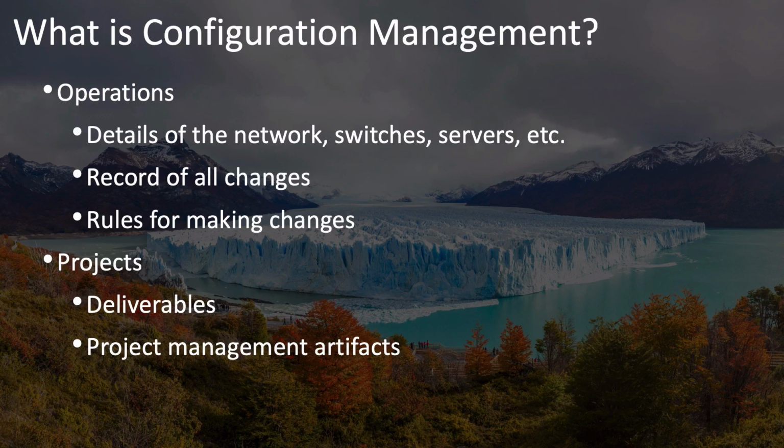The benefits of configuration management for projects include knowing that you've got the correct version of any of the configuration items and that that correct version is being used by the project team, knowing that any changes to configuration items, such as your code, are made only by those who are authorized, that all of the correct stakeholders receive proper notification of any changes, and that you have a complete record of changes and a version history so that you can go back to previous versions of these different components.